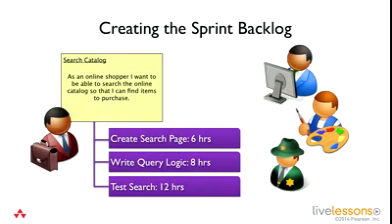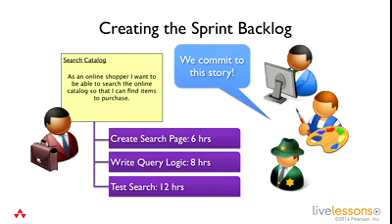Once you've created that sprint backlog for all the items that you've committed to, you should review it and make sure that there weren't any icebergs, things that you thought were small that now once you broke them up into all their parts are a lot bigger. After that discussion happens and you still feel that you've gotten enough that you can handle in a sprint, you want everybody to commit to this story. And it's actually something I have the teams actually say. We commit to delivering all these stories inside this sprint. And it gives a sense of responsibility to the team. We are giving them the power to set their own pace, but if you set your own pace, you want to make sure you are setting a pace that is achievable and that you can commit to.